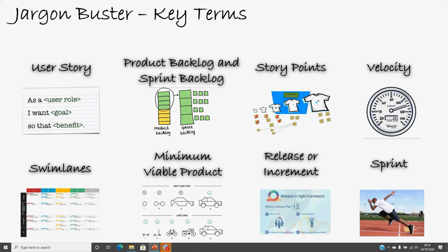So we have to say that, okay, this particular user story is of scale 1, or we can say that this particular user story is of t-shirt size small, or we can say that user story 4 maybe is of t-shirt size extra large, or we can say a number that from 1 to 5 it is of complexity 5.